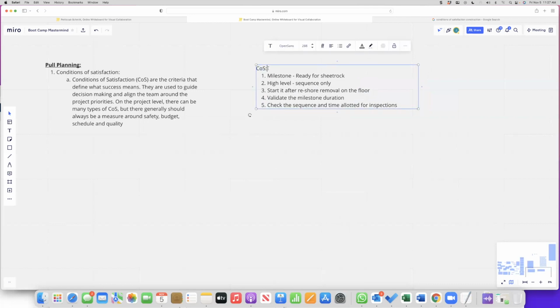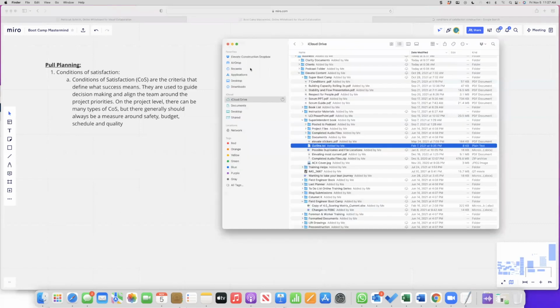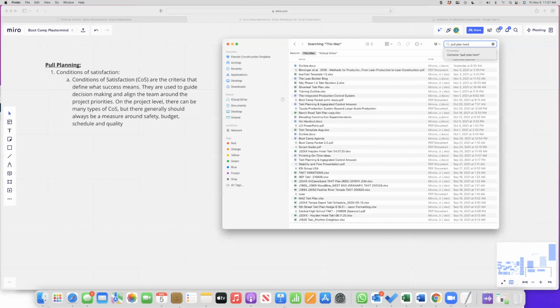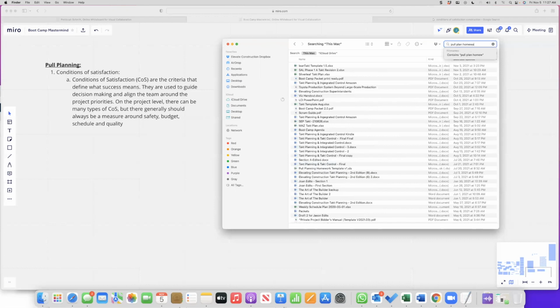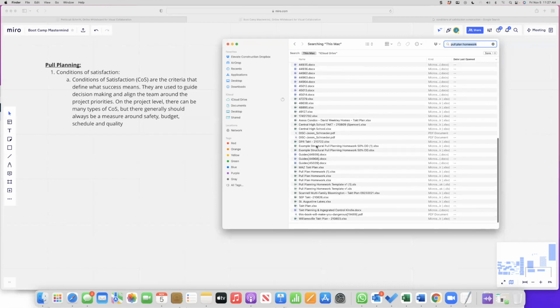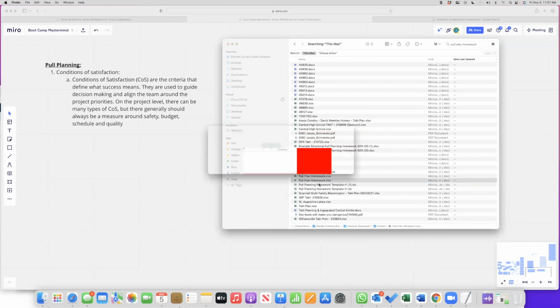Well, I'm assuming so that people know what they're doing before they get there. I mean, what we plan on doing is sending out criteria and probably our takt plan and really explaining to them what the flow of work is. And we have cards that we're making up for them to fill out for their activities for each area, durations and probable manpower and material needs and any procurement issues. So I think that's why you need to have those milestones out there and where you're starting from.